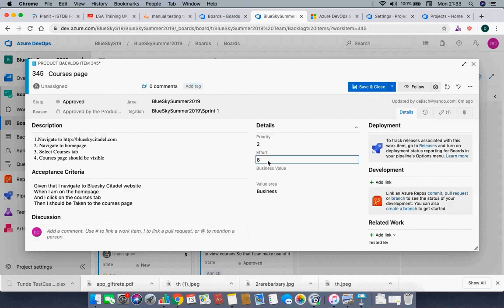During the internship, we'll have particular sessions to see how it's done in a normal working environment. You will have the testers and the developers. They come together and you put an estimate on the story. Then if there's a common consensus, you agree. But if someone is saying 1 and another person is saying 8, they will ask, why do you say 8? Or why do you say 1?